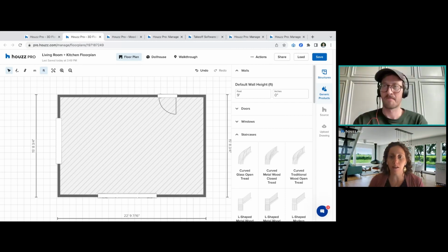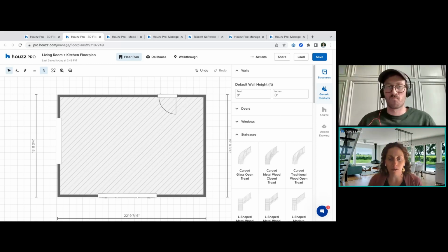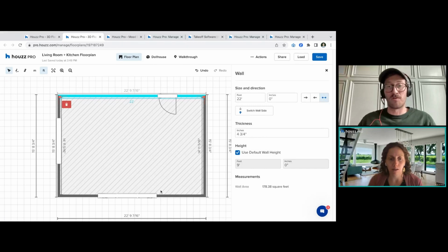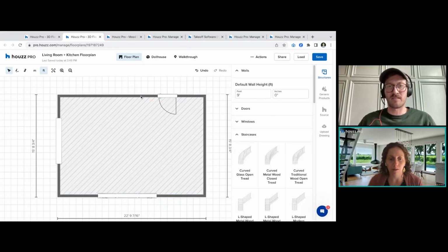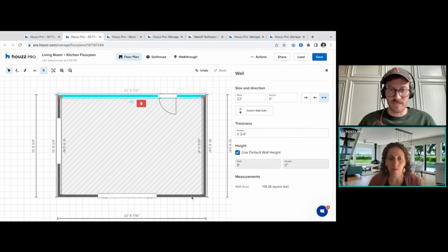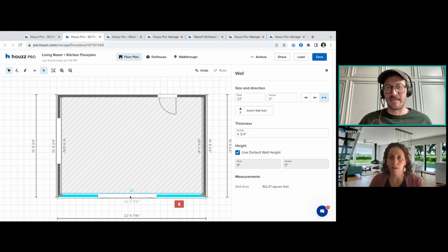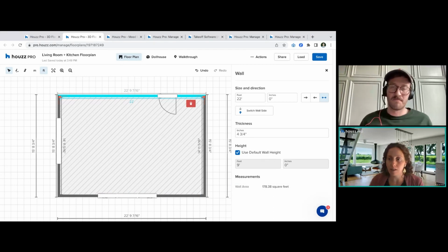When you do that, the square foot function, does it remove the area of windows and doors? No, it still doesn't. Or actually, yes, it does now. Sorry, I thought for some reason it didn't, but it actually does. So right here, we're at the measurement on this wall, that's subtracting a door. This one would be taking out a window. So that's why there's a slight difference on those, but otherwise they're the same 22-foot wall. Let's keep going, and then I'm sure we'll have other questions.